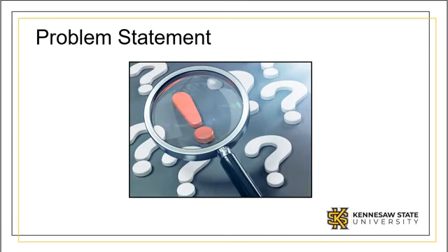The problem statement is contextually most like the purpose. It discusses the issue that the team wants to improve. Make sure your problem is as descriptive as possible. Make sure to include how long the problem has existed, what measurable item is affected, what the business impact is, and what the performance gap is.